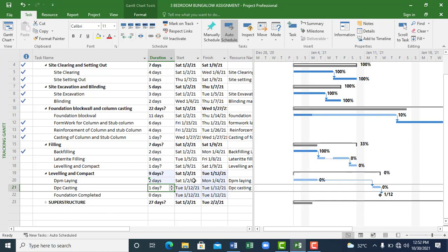It will move everything forward. But if I don't schedule it automatically and I don't establish the relationship, it's a lot of work to make corrections. Because you know that if your start time for an activity, such as excavation, has changed, it will affect every other thing. But if you have scheduled it automatically and you've established a relationship with them, then everything will move forward at the same time.